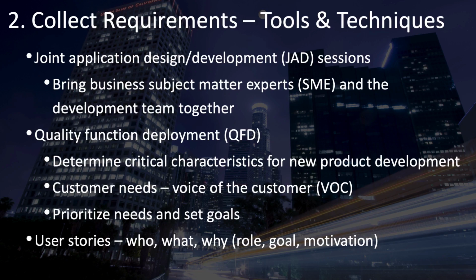Quality Function Deployment, or QFD, comes from the manufacturing industry. This is another technique that is a facilitated workshop in which the focus is to determine the critical characteristics for new product development. It starts by gathering the customer needs, known as the voice of the customer. Once these needs are understood, they can be sorted and prioritized, and then goals can be set based on these needs.